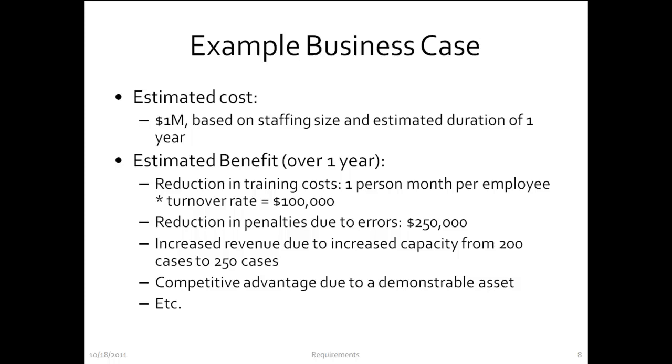that there was a turnover rate. Basically, they hired 10 new employees every year. So combining the two together, we came up with a benefit in terms of reduction in training costs to be about $100,000 in that first year.